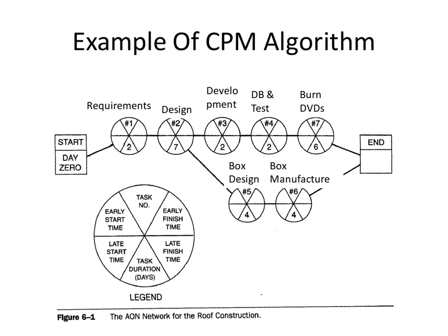Okay, so here we have this path going from start to finish. It's the longest path, which is the critical path. And there's no give to that. If you slack off on task 1, 2, 3, 4, 7, you're going to delay the project.